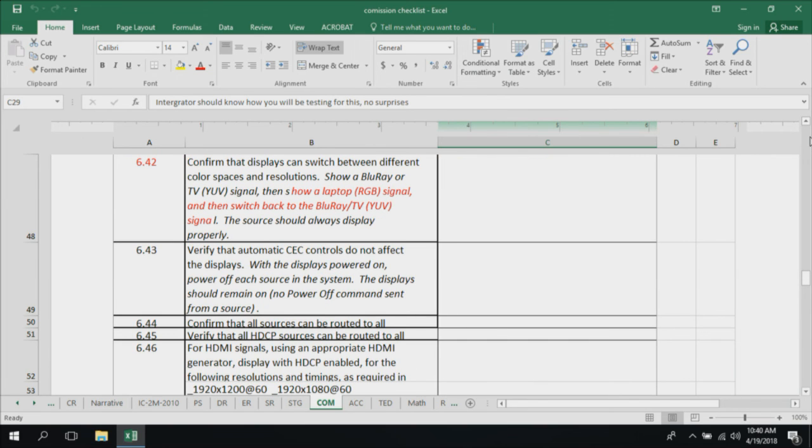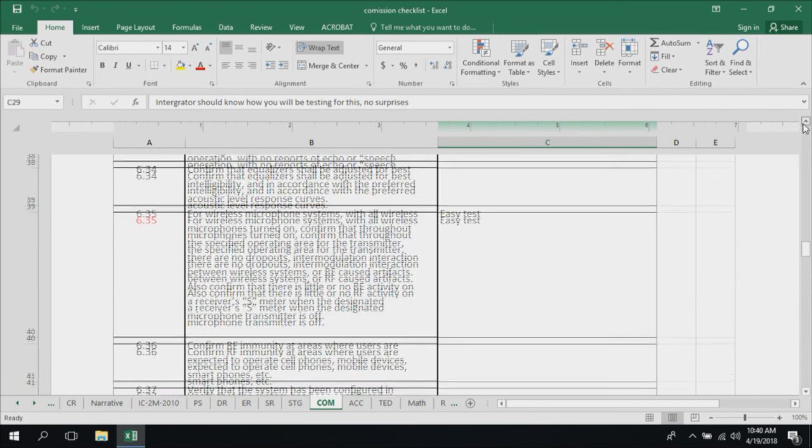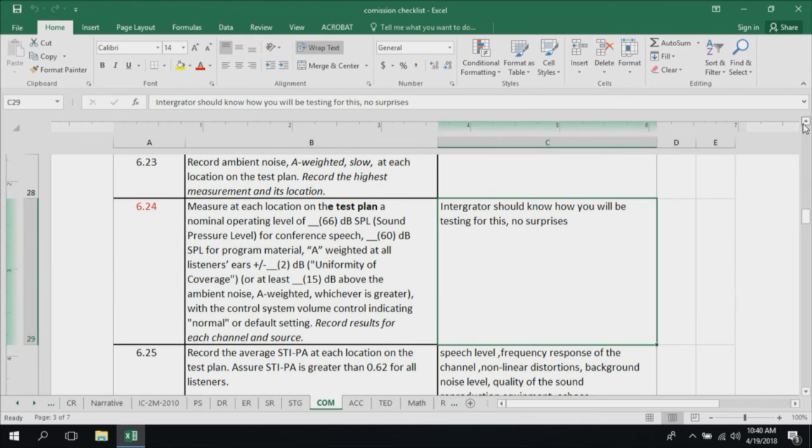And a couple other little ones up here at the top I was going to talk about. This talks about your test plan and getting really specific. Again, you can change the wording on this, but getting into what's my dB at each listening site going to be, what's my tolerance, and how am I doing that. Very important for the audio portion of your design.